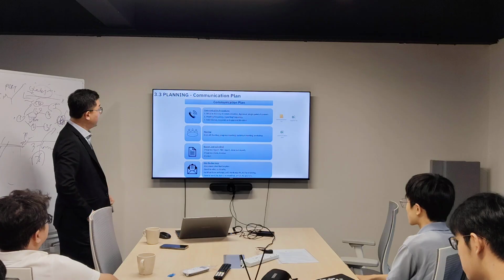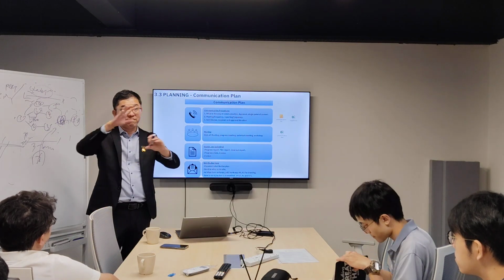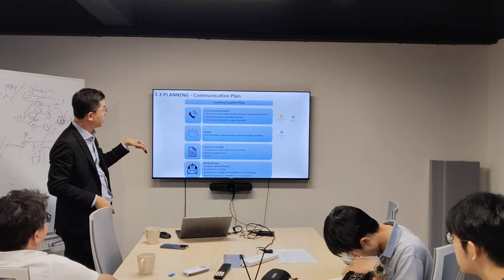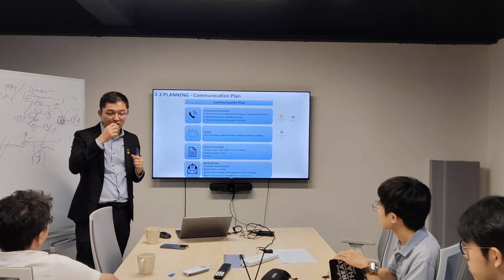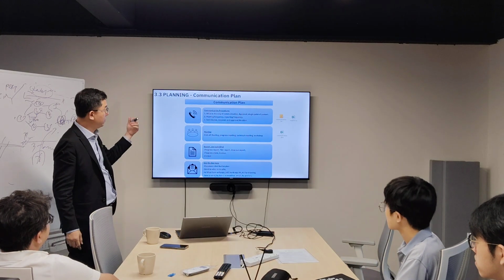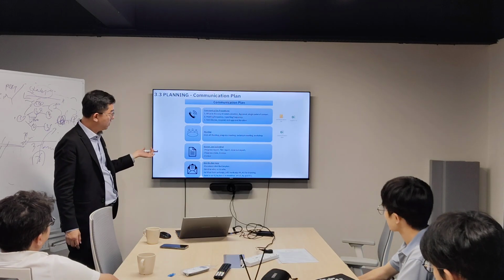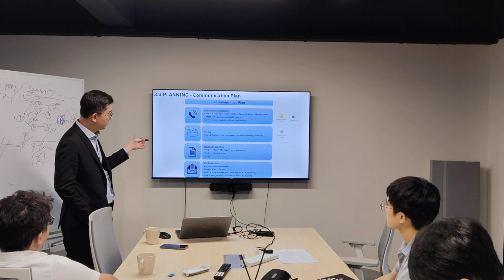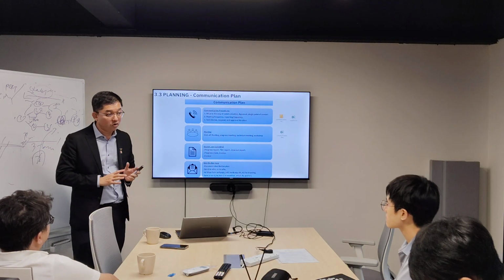Okay, and then still remember, earlier on I highlighted that if we have the whole project team, we need to know who to communicate with. That's why we need to have this communication plan. The communication plan is not limited to one page of this matrix, the communication matrix. We need to have the communication procedures and meetings, reports. We need to come up with sample reports, the submitters, the distribution route. This submitter needs to distribute to who, to upload, to review.